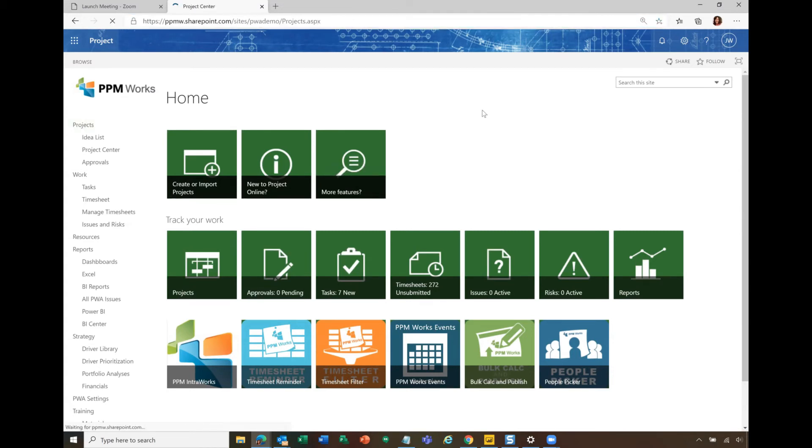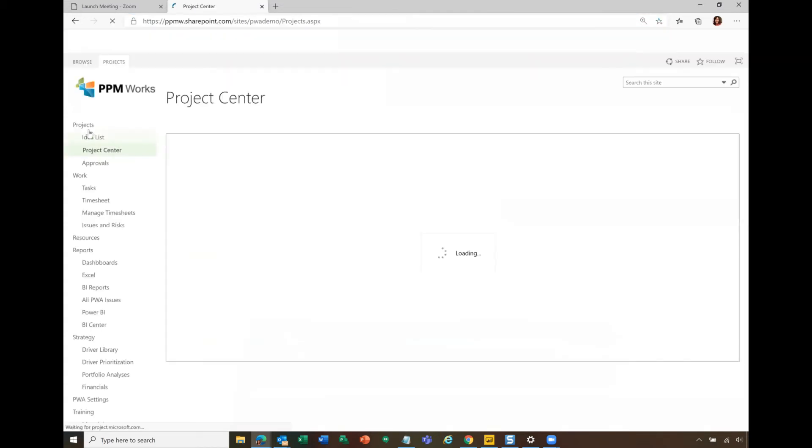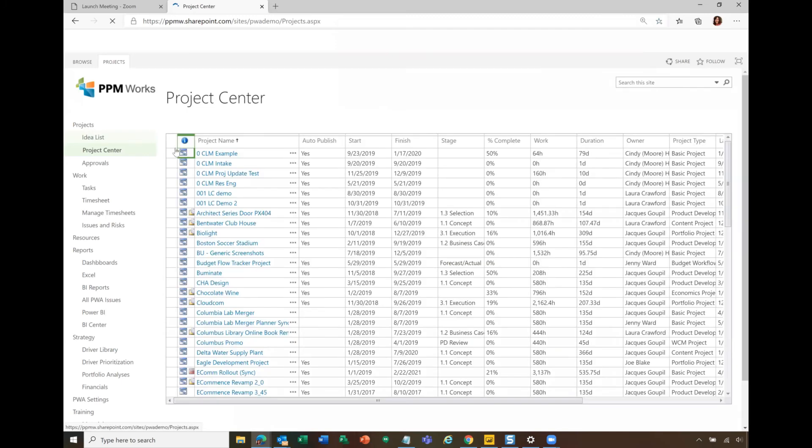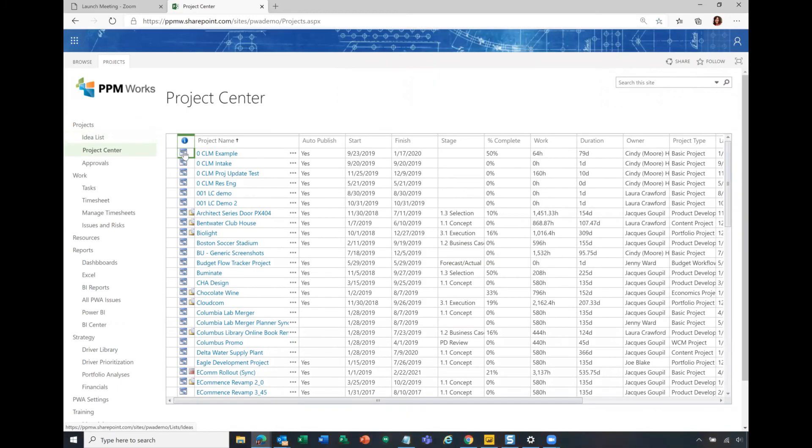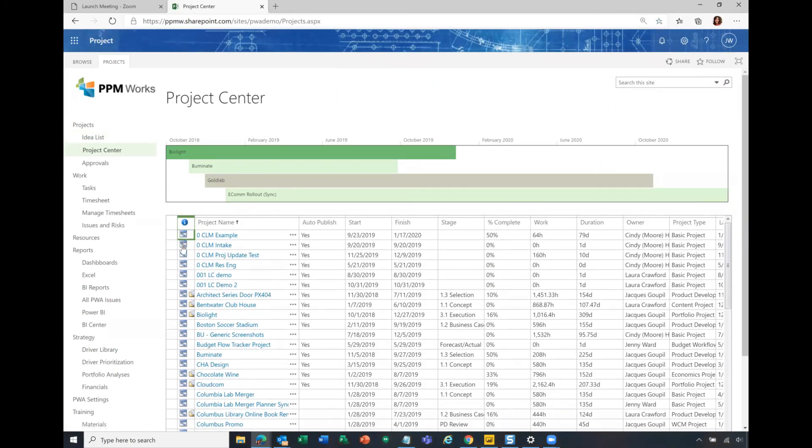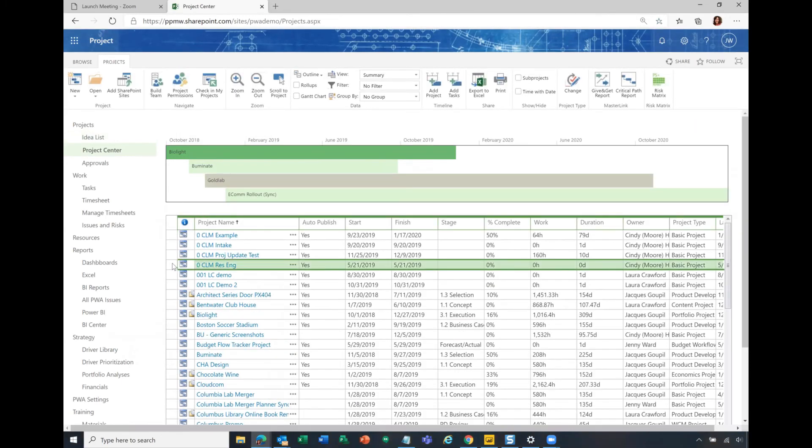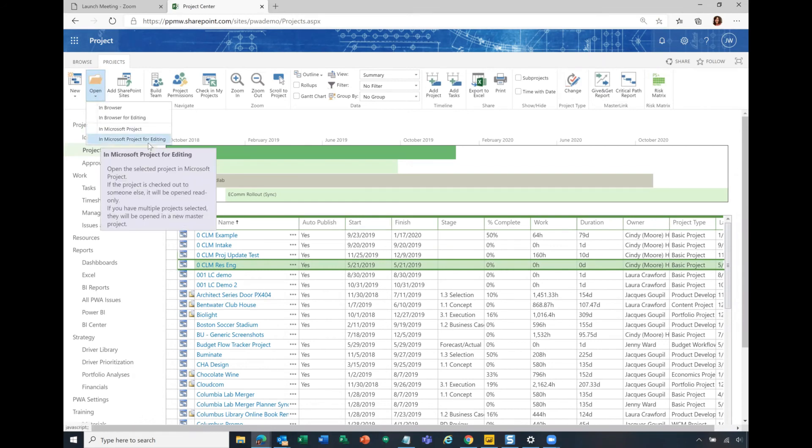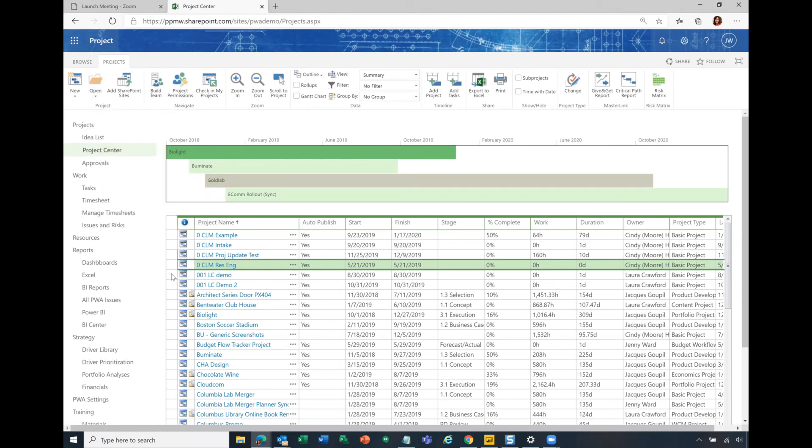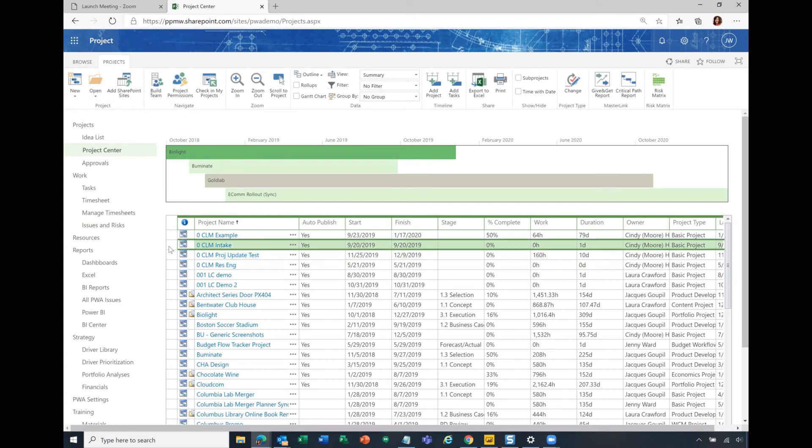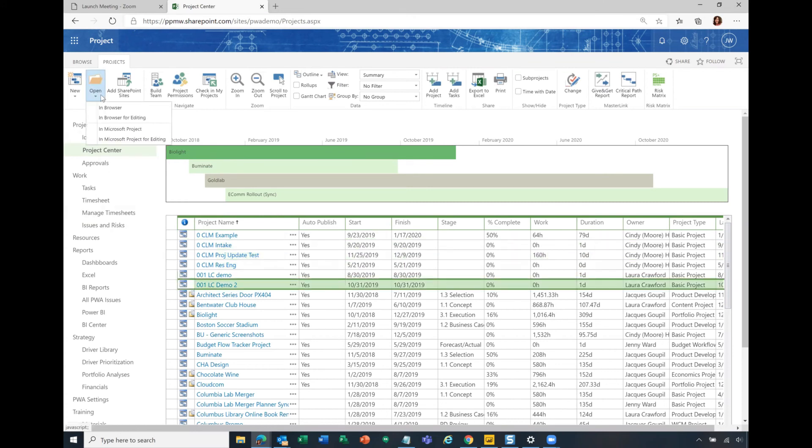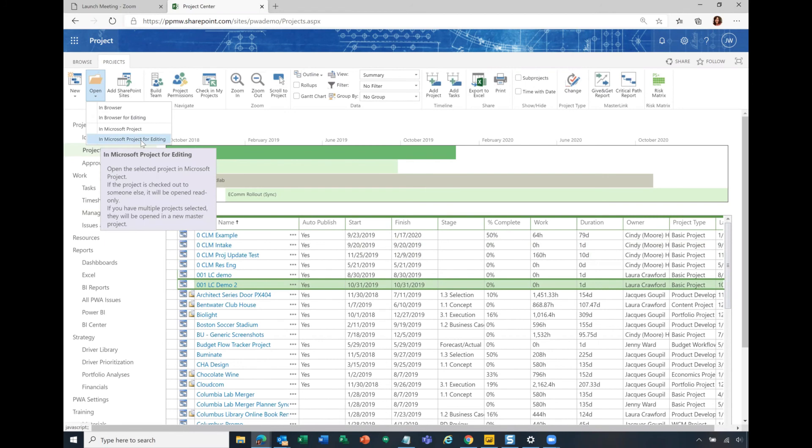Once you are connected, then from Project Online, you're going to be able to click on these icons to open the project in Project Online. You can also highlight the project so that you can click Open and open in Microsoft Project for editing. I have highlighted this by clicking on the leftmost box here in the project center. Again, I go to Open in Project for editing.